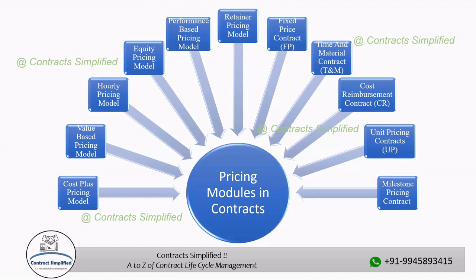For each milestone, there is an associated payment amount. The payment structure can vary widely depending on the nature of the project and agreement between the parties. Typically, the more complex or critical the milestone, the higher the payment associated with it. The contract should include an estimated timeline for completing each milestone. This helps in managing expectations and ensuring the project stays on track.